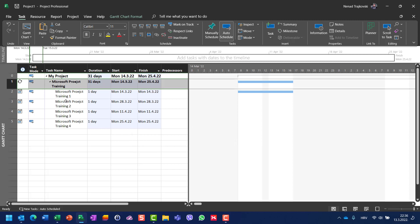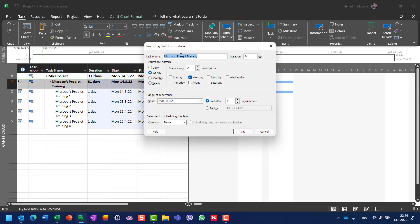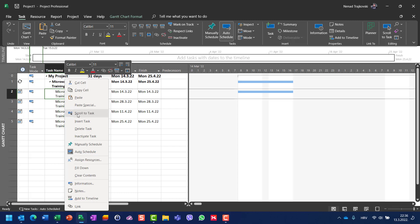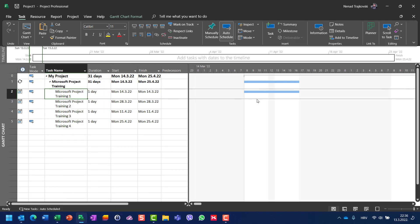You will see that Microsoft Project—here I have a typo, so I can change it to Project. I will see that I will have Microsoft Project training one, two, three, and four, each will last one day.